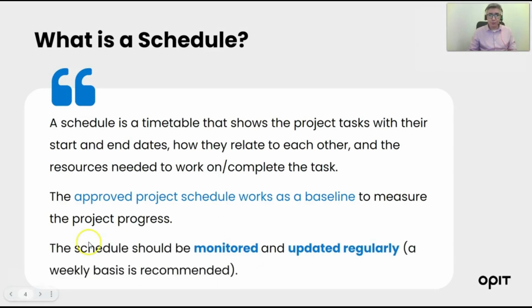The schedule should be monitored and updated regularly. It's recommended to be updated at least on a weekly basis, not less than that. So it's not recommended to update the schedule on a monthly or bi-weekly basis. At least once a week, the schedule should be updated.